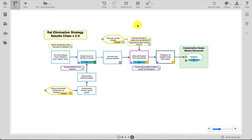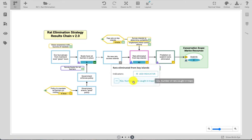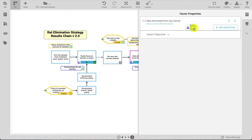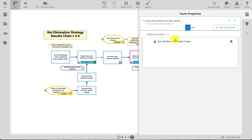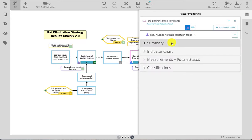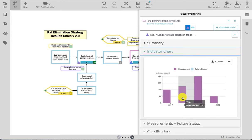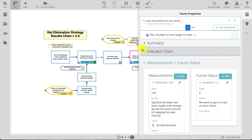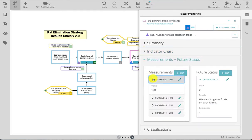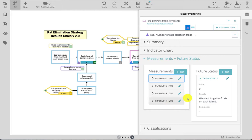To view or update indicator measurements, either navigate to an indicator directly from the diagram canvas, or if you're already in the factor properties panel, for example viewing objective content, you can navigate to related indicators in the factor properties panel. The indicator chart shows both current measurements as well as future status. Go to the measurements and future status section in order to view all past measurements recorded for the project as well as details about the future status.